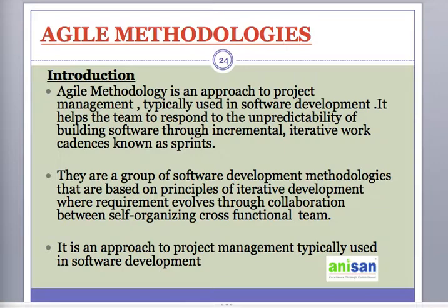So we will build the application or the software or the product sprint by sprint. A sprint is basically a part of your release. Every sprint consists of 2 to 4 weeks of work, depending on which features, functionalities, or requirements you pick up. So typically that's the timeline we can consider for a sprint.